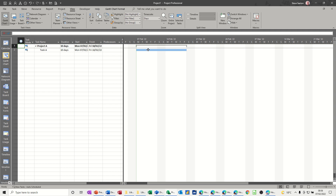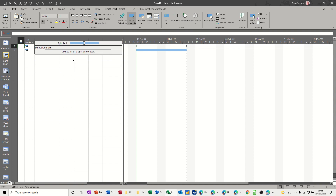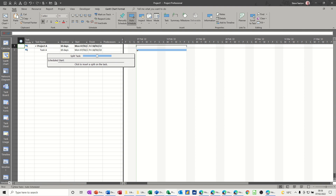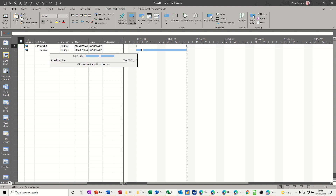I'm going to split that task using the split task tool, which is on the task tab. It's this one here that looks like a Christmas cracker that's been pulled. When you click on that, you get this little help that comes up — it's just a guide. As you move your mouse to the task that you want to split, this little help box becomes active. You can see the date on there, Tuesday the 8th, and as I move forward it just gives me the date.